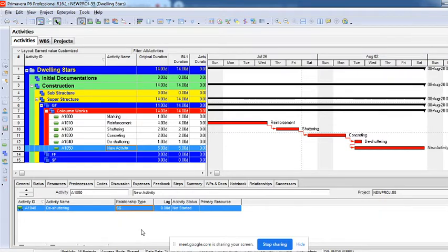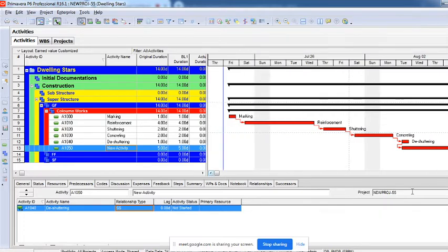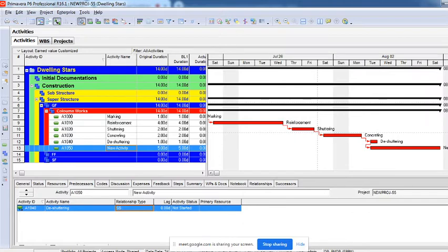The concept called the critical path method, which we have explained on that particular day. The longest path of the project is known as the critical path, or if you want to go with the formulas, late start minus early start. If late start minus early start is equal to 0, then that activity is called a critical activity. All the critical activities of a path are called the critical path. Usually that will be the longest path of the project. Alright, so you can see here right now we do not have any other path. There's only one path, so all the activities are critical in this case.